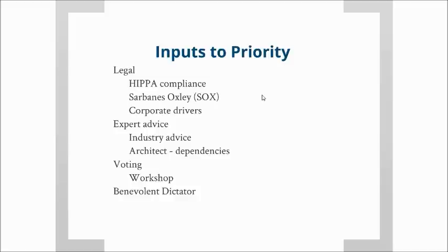So if you're looking at a list on a piece of paper, the most important user story, the most important requirement, is on top of the list, and that's what we're going to work on first. Then the next one down, we'll work on that because that's the next in importance, and we'll just continue on down the list, just working through them as they are prioritized.